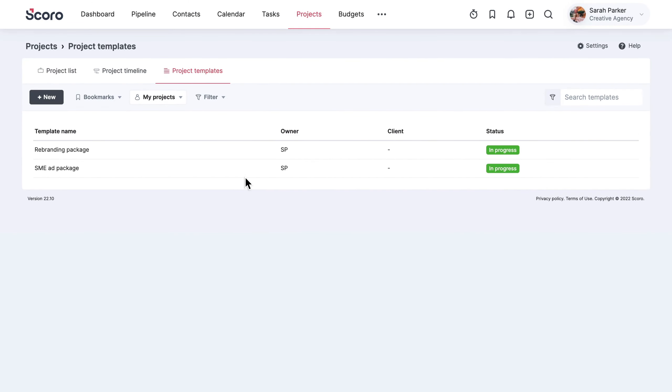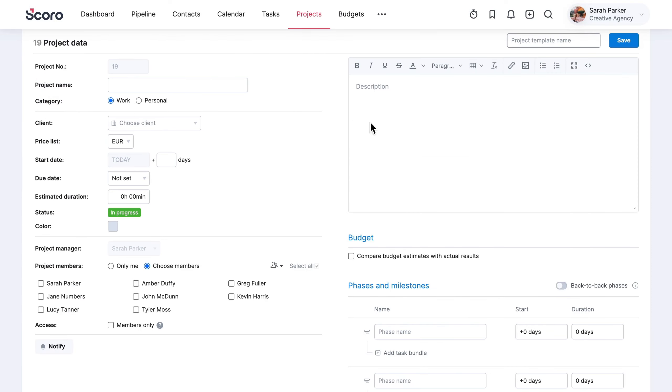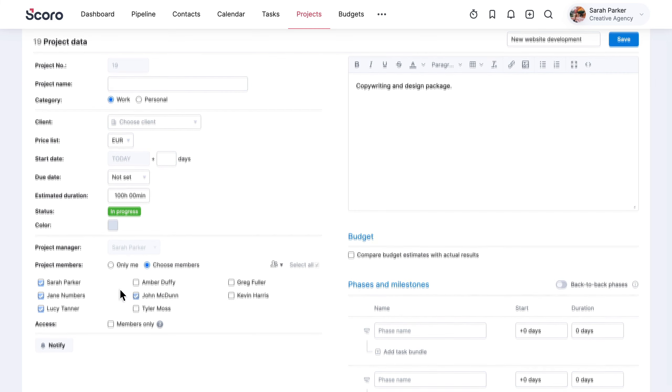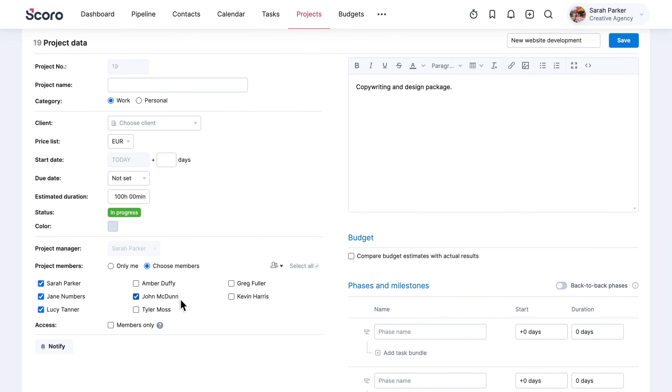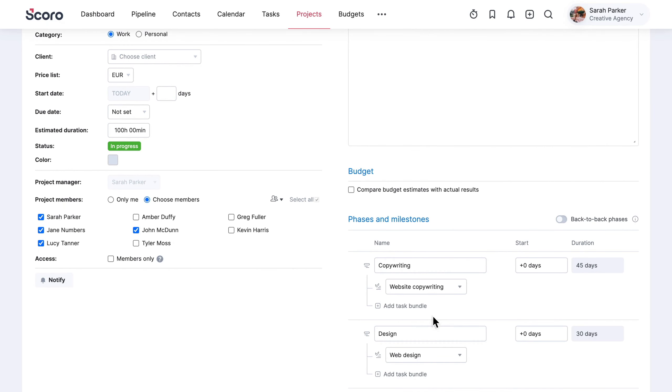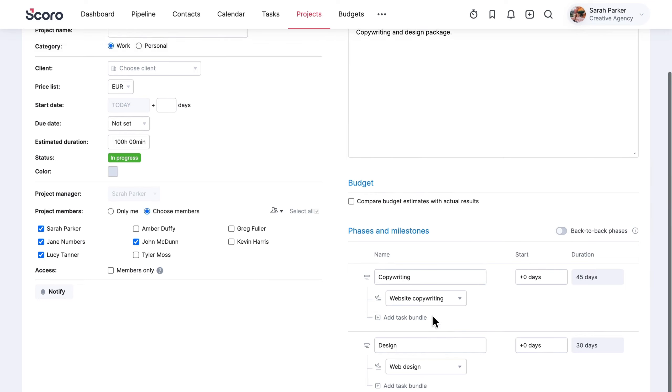Navigate to project templates in the project view to add a new template. Fill in the project description and expected duration. You can also select the project team. Structure the project in phases and add your pre-made task bundles for each. Save the template for future use.